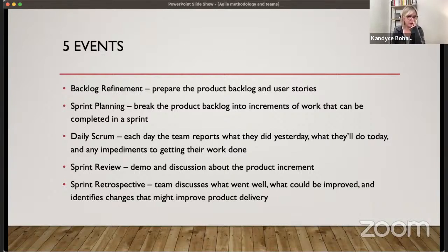And then finally, there is a sprint retrospective. In a retrospective, that means we're looking back. We look back over the last sprint that we just completed, and we talk about what went well, what didn't go so great, and how we can improve it. Again, this is led by the Scrum Master, and you just try to identify ways to continuously improve your Scrum process. Maybe we need to change our working agreement ever so slightly. Whatever it is that the team needs to do their work more efficiently, that's what we try to identify there.